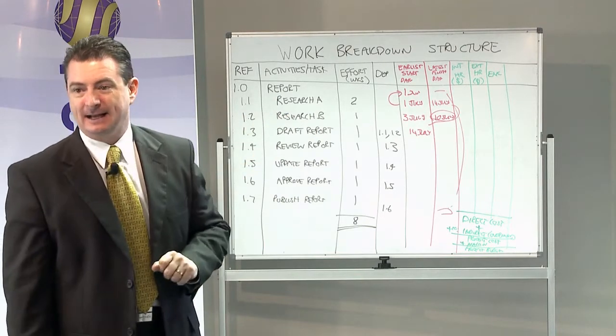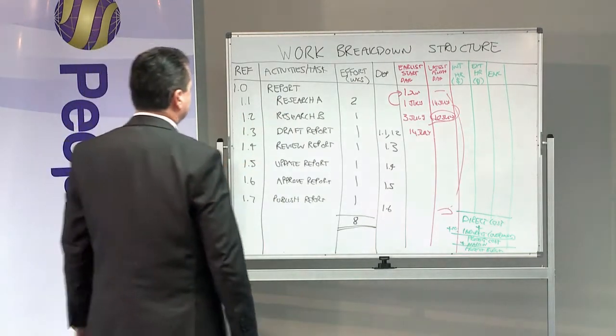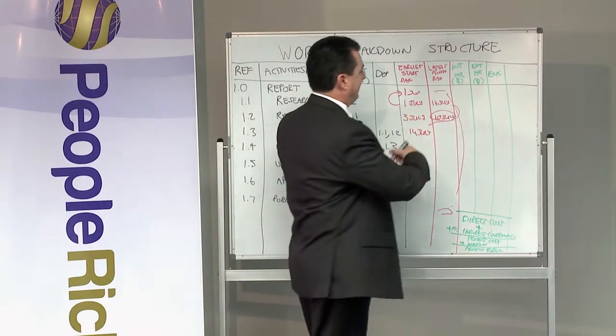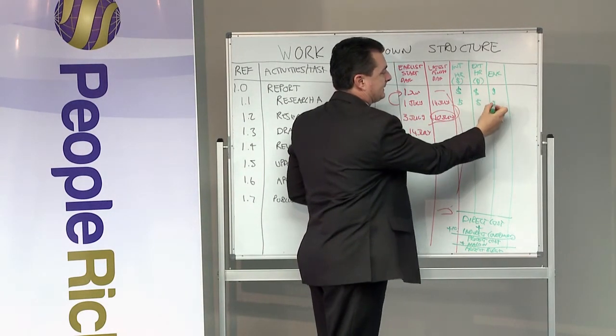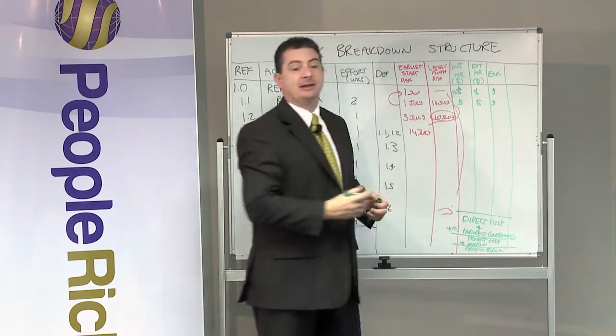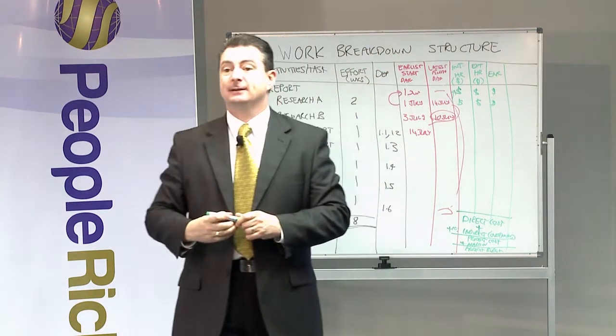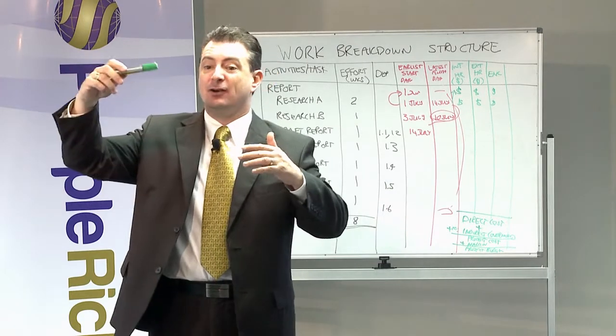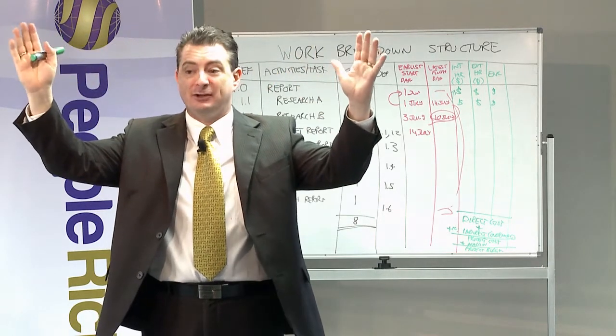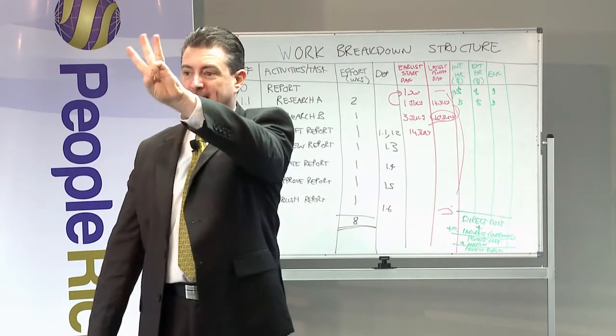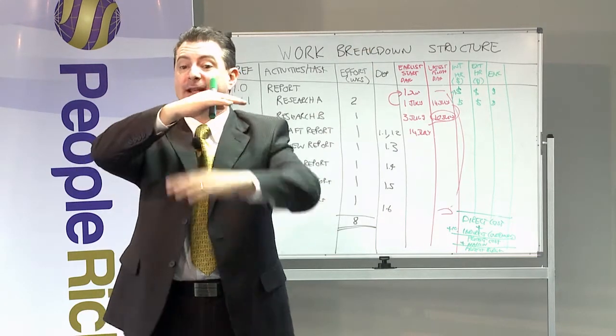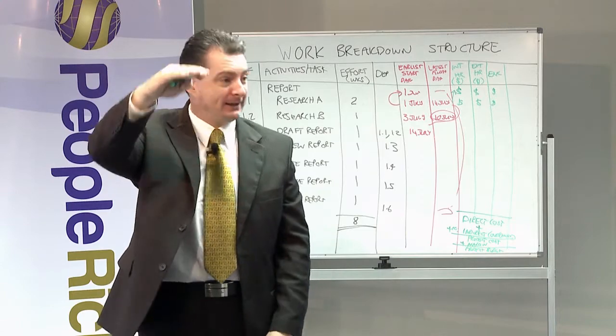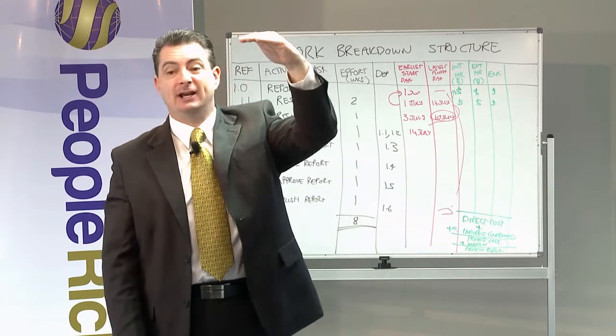Here's the thing to note: once I've got a cost on each of these at a task level, you can see that the task level adds up to give me what the cost of the report is. And then if I add up all the activities, I've got what we call the project budget. So costs are calculated at three levels: task level, they add up to the activity level, and then all the activities add up - that gives me the project's budget.